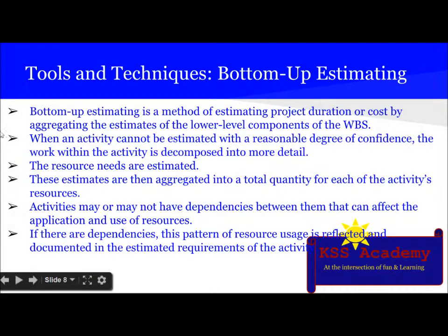Let's learn about bottom-up estimating. Under tools and techniques, bottom-up estimating is a method of estimating project duration or cost by aggregating the estimates of the lower level components of work breakdown structure. When an activity cannot be estimated with reasonable degree of confidence, the work within the activity is decomposed into more detail.